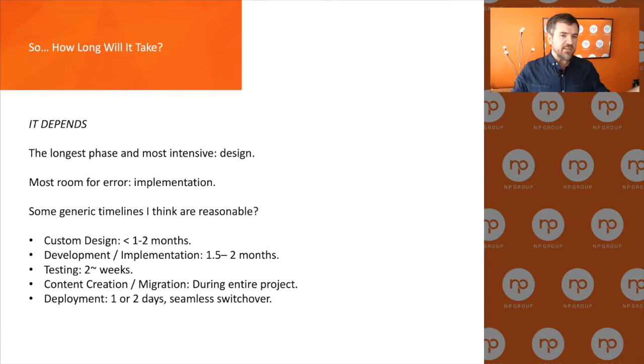So at the end of all that, we're through our phases. Inevitably, someone's going to have a question for me. How long does one of these projects take? It depends. I hate to say it, but it depends, every project is different. I can tell you a couple of things that are common across projects. The longest phase and the most intensive for you is always design.